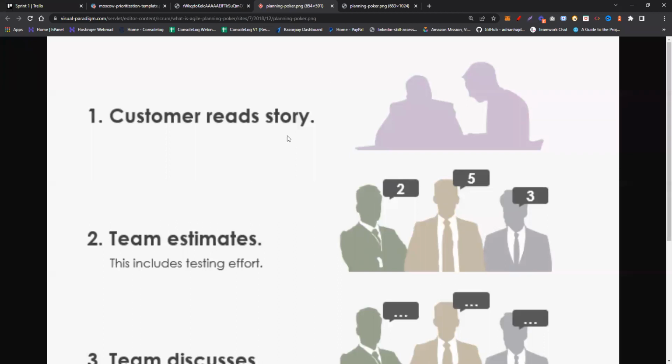So planning poker, how does it happen? We all know, in planning poker we follow the Fibonacci series, correct? Like 1, 2, 3, 5, 8, 13, 21, correct? Or if it's a very high number, it's coming like a complexity. Suppose you are saying 34. I would say don't consider 34, just consider up to 21.